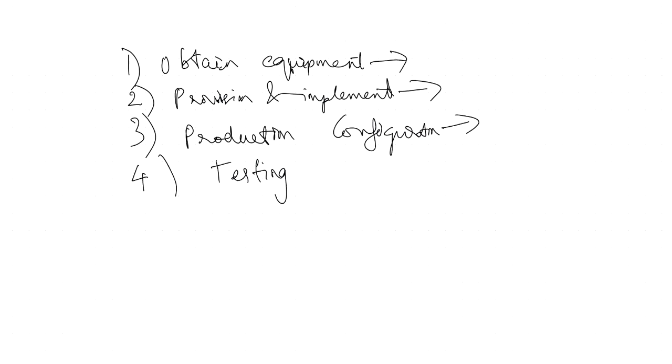So the next major task will be go live, right? Go live with the new equipment. That means you cut over to a new production site. You have to make sure your data and content integrity checks are done, right? And switching web and data access to new sites means you have to make sure you run a series of predetermined tests to ensure the data is really accurate here, right? And you have to make sure any updates that need to be mirrored are planned in the schedule as necessary. Again, go live, with the predetermined tests.